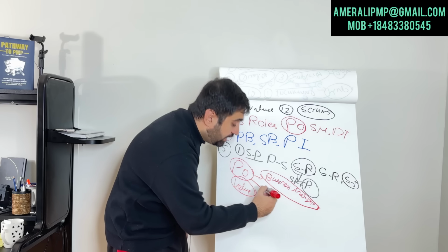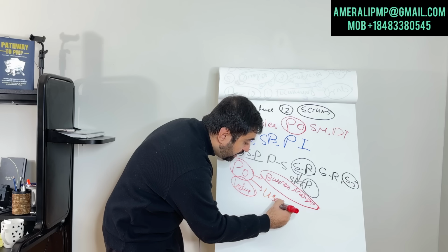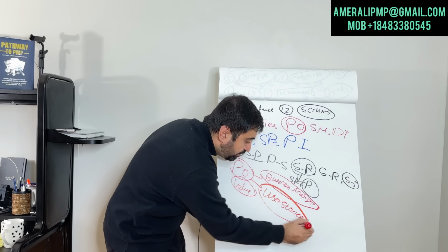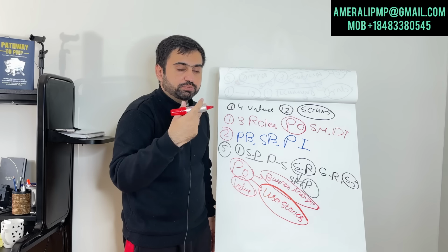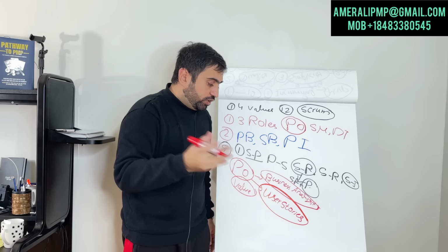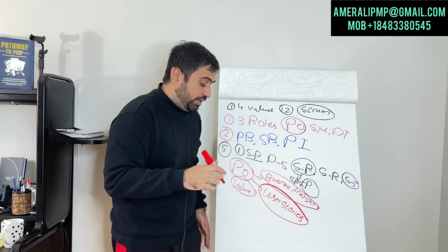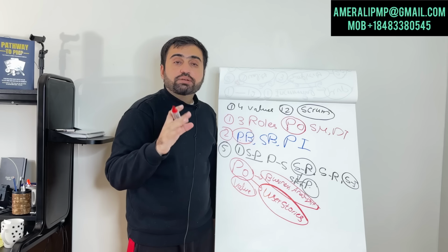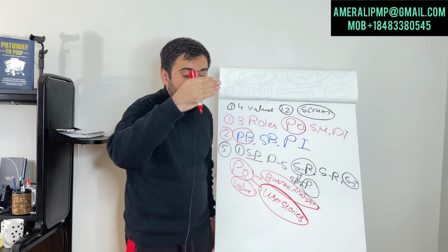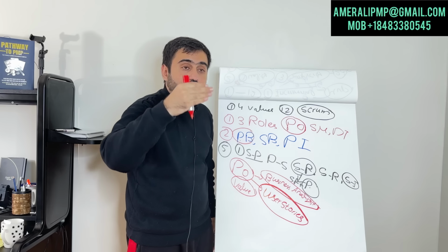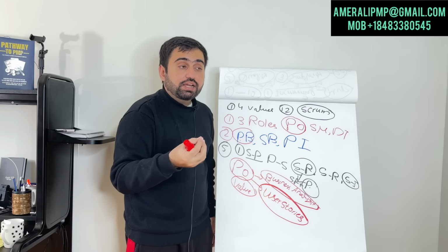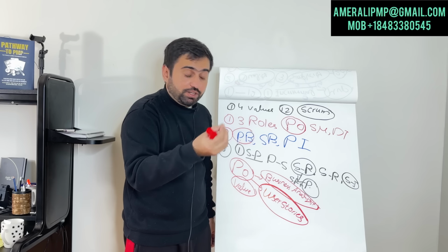Requirements are called user stories in Agile. He collects all the user stories from the customer, sponsor, etc., and puts them into a document, and that document is the product backlog. Product backlog is nothing but the list of all the requirements, the list of all the user stories that we need to complete. They are prioritized by high value and high risk.